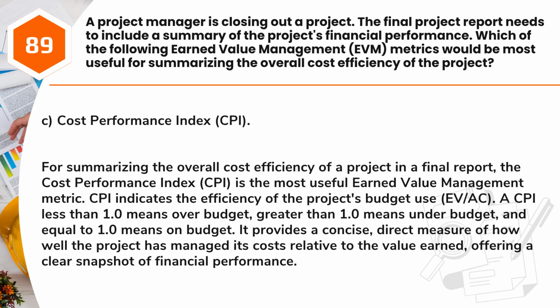Answer: C. Cost Performance Index, CPI. For summarizing the overall cost efficiency of a project in a final report, the Cost Performance Index, CPI, is the most useful earned value management metric. CPI indicates the efficiency of the project's budget use, EV/AC.